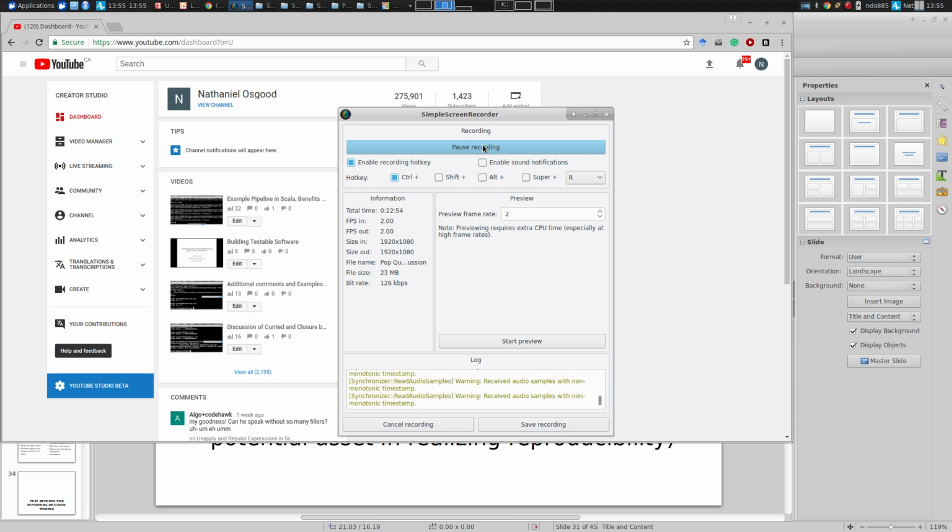But another thing a risk officer should be doing, should put an emphasis on, is looking for new types of risk as well. They should be scanning: are there any new types of risk? And often new types of risks do emerge, even in the course of this semester, as you undertake new stages of the project. You incorporate new technologies. You make a different choice than you anticipated early on about how you'd approach things. New risks come up. And part of risk scanning is keeping an eye out for new types of risk and assessing them and maybe putting them on your risk list and reprioritizing your risk list.